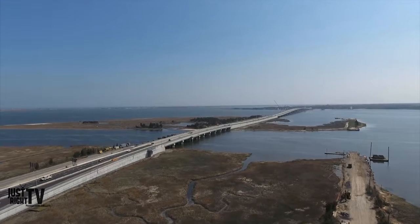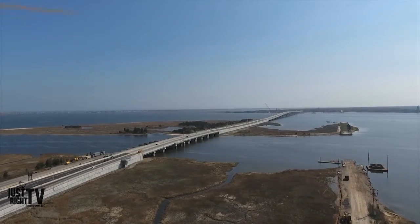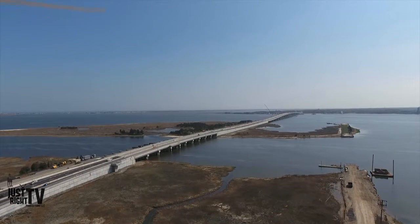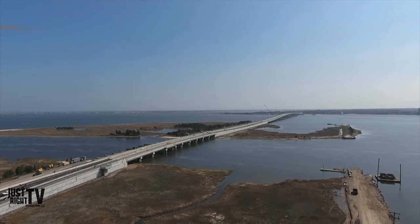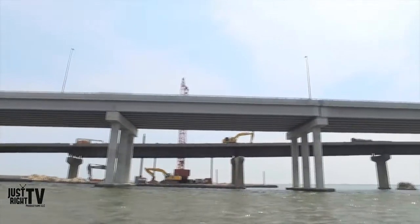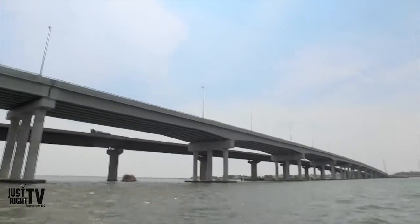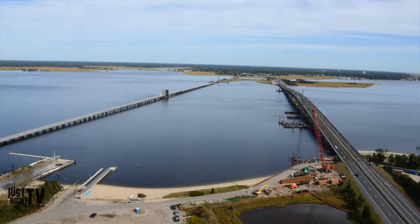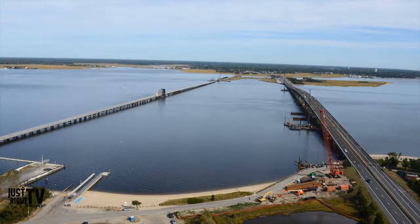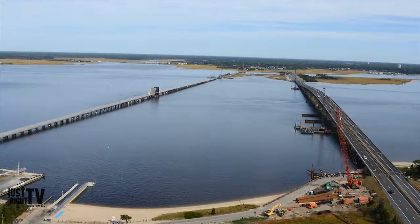This replacement of structures on the Garden State Parkway at milepost 27.8 is an all-concrete structure from tip of the massive 30-inch square concrete piles to the surface of the 70-foot wide deck surface and everywhere in between. In May of 2013, the authority awarded a contract to a joint venture, Route 52 Constructors, to totally replace the existing Great Egg Harbor Bridge and the drag channel structures.